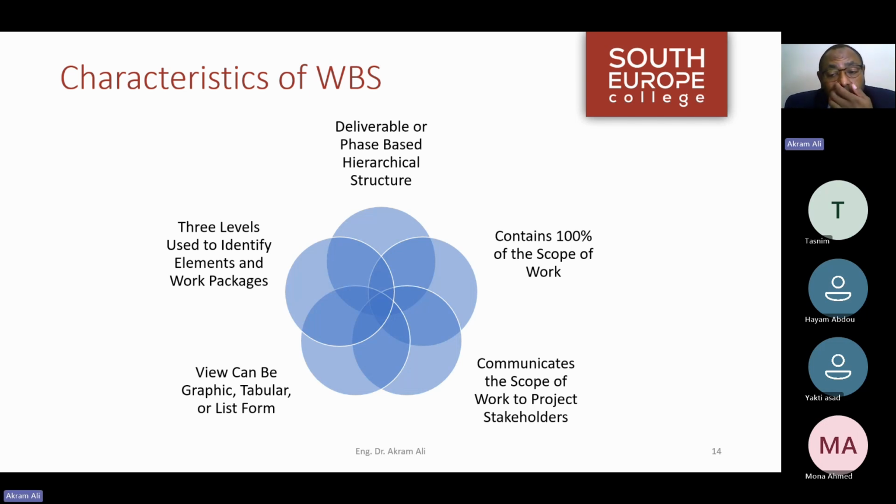So in order to have milestones, so that I will only pay against achievement of such milestones, I need my planner and scheduler to understand that I need milestones to do a good contract. A very good contract is a contract that is built around milestones. So if I have a delayed milestone, I apply damages to the milestone. I don't wait for the whole project to